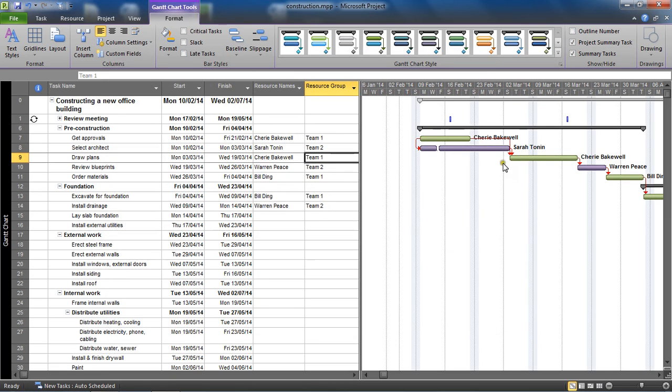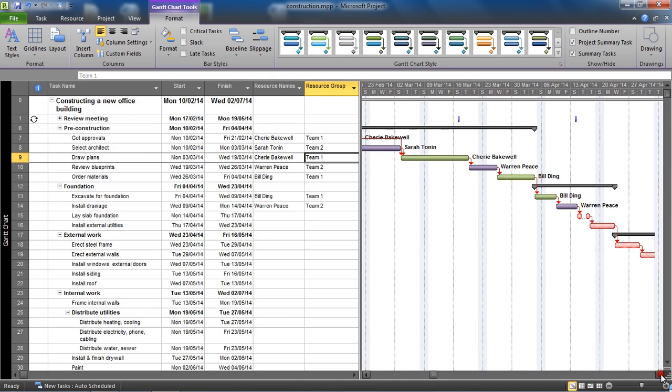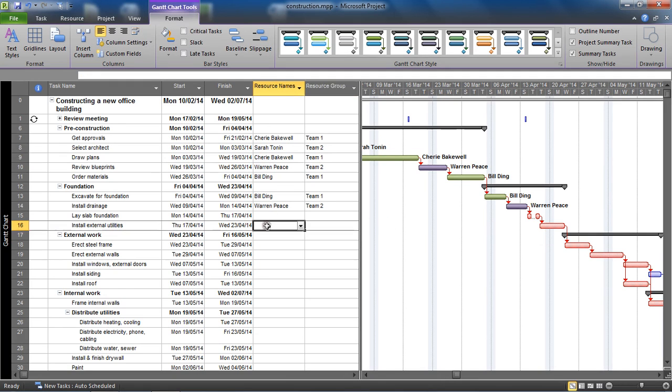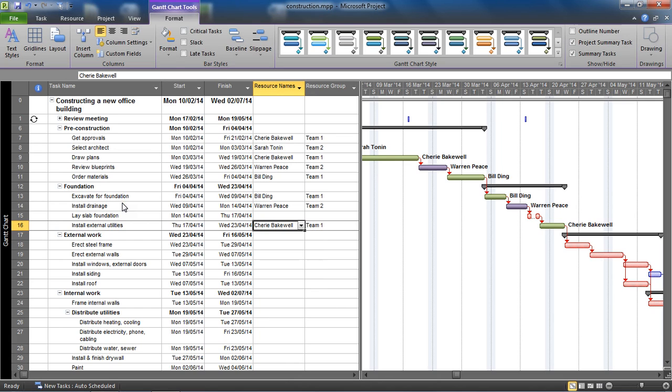But more importantly, if I can scroll to a bit of vacant space, let's assign a resource to a task. Where's Cherie from team one? Expecting a green color. Cherie... it's green. So our task bars now are automatically changing color depending on the resource group.